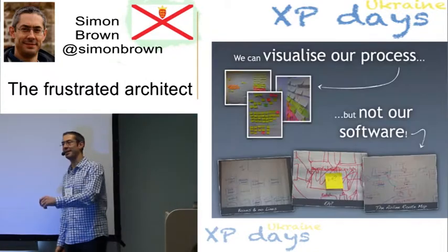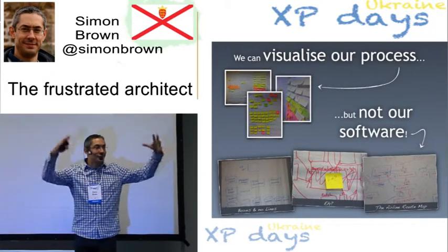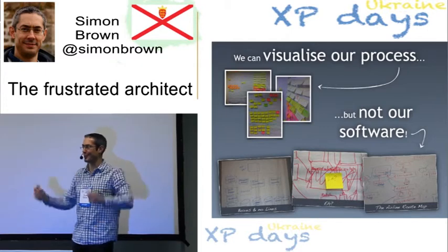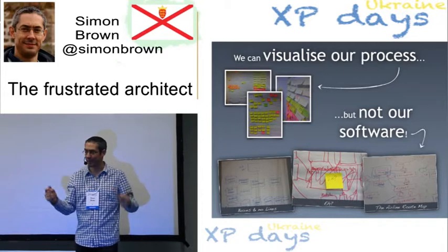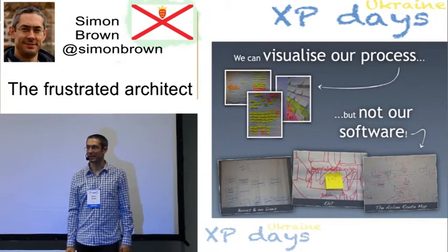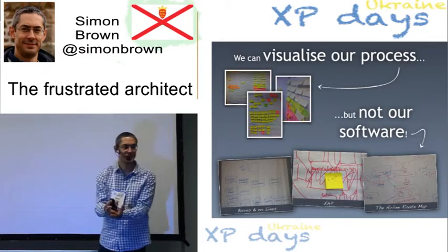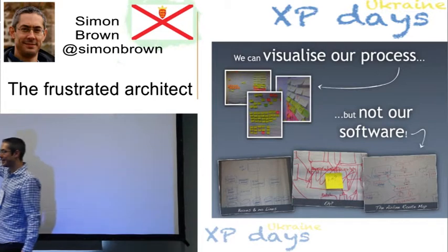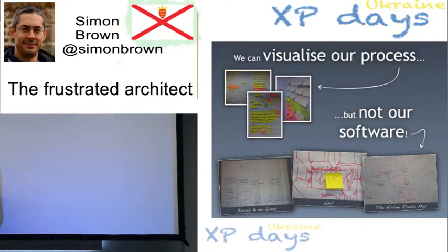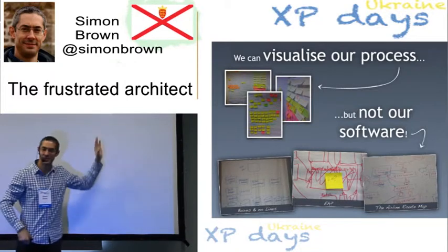Who's using Kanban here? Story walls, that kind of thing. You know, visualizing your process, index cards, post-it notes on walls, virtual, physical, electronic, whatever. Yeah. And it's great. So you take a big chunk of wall, you have your backlog of things you need to do, tasks or user stories, whatever. And you know, over here on the left, in your first column, that's stuff to do. In the middle is stuff that's in progress, and over here is stuff that's done.